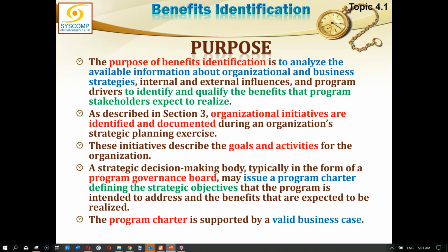And then you have feasibility, that is more on the financial side, the pros and cons and how they align with the strategy. Mostly from the financial point of view, but it is not only the financial feasibility. This feasibility includes whatever kind of feasibility you are trying. Feasibility includes three main areas: strategic feasibility, technical feasibility, and financial feasibility, in the same order of priority. Strategic feasibility is at the top, technical is second, and the lowest level is the financial feasibility.